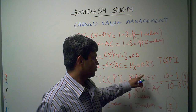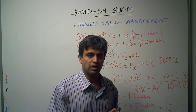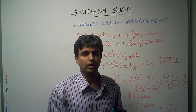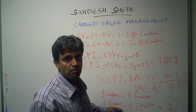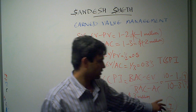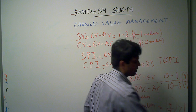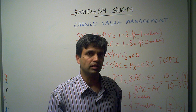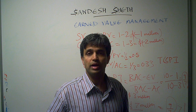So the formula is simply what I have explained: what I still need to accomplish, divided by the remaining budget I have available. Taking this ratio gives a TCPI of 9 by 7, which is greater than 1. As we know, greater than 1 implies that I have to work at a higher level of productivity compared to what I was doing previously, and also at a lower cost.